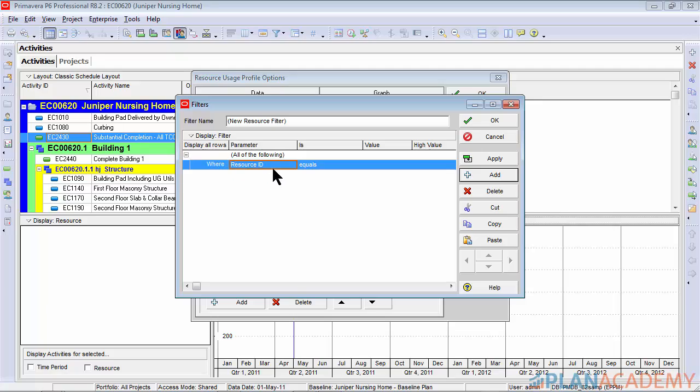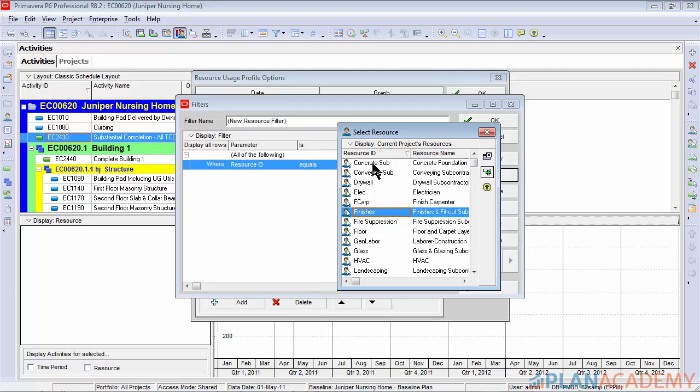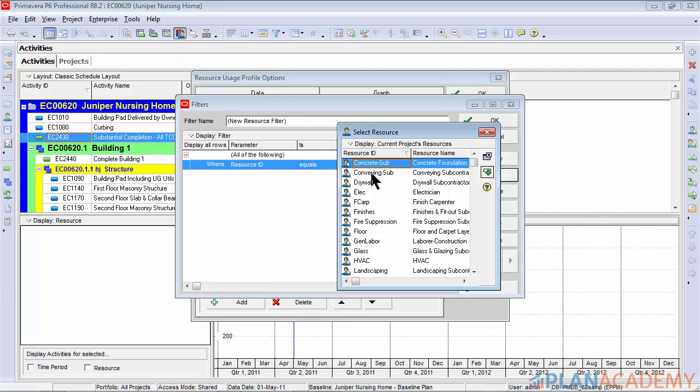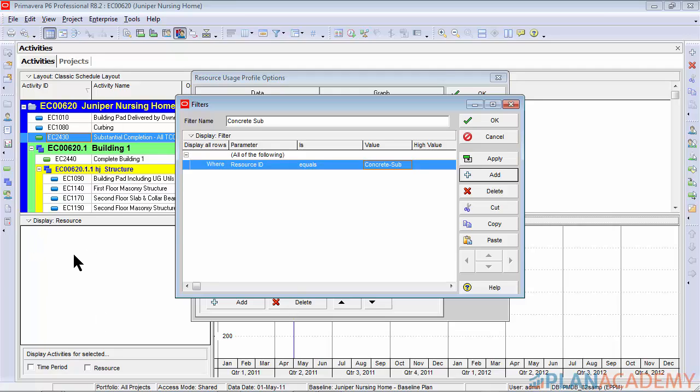So selecting resource ID, we'll now go over here to the value area and we get our familiar little button. If this isn't filtered, you want to filter this by the current project's resources and then sort them alphabetically. It'll make your life a lot easier. Essentially the first filter that we're going to build will be for the first resource I want on my histogram, the concrete sub. Select him and then call this concrete sub. This name here that we put in the filter will show up on the left hand side and it tends to be part of the labeling, so you want to put a nice descriptive name in there - it can show up on printouts.